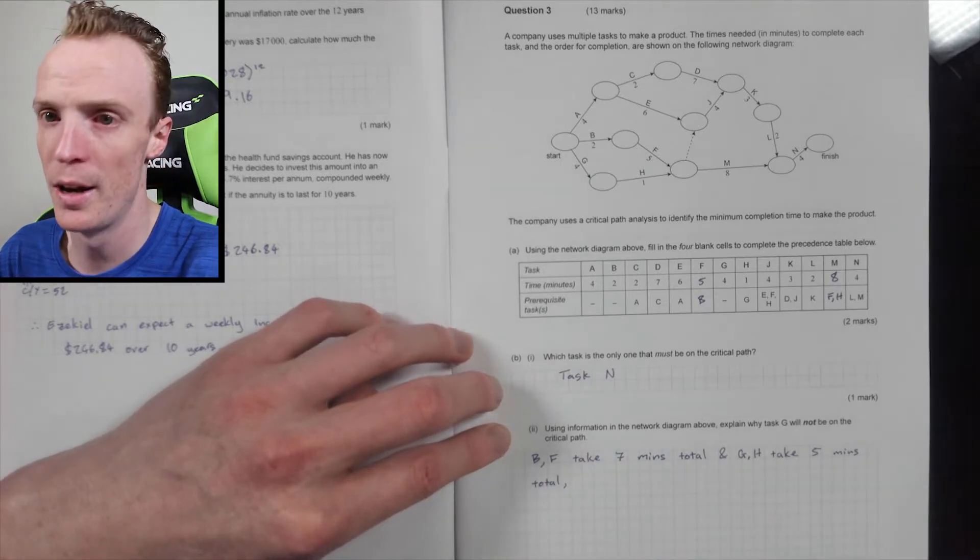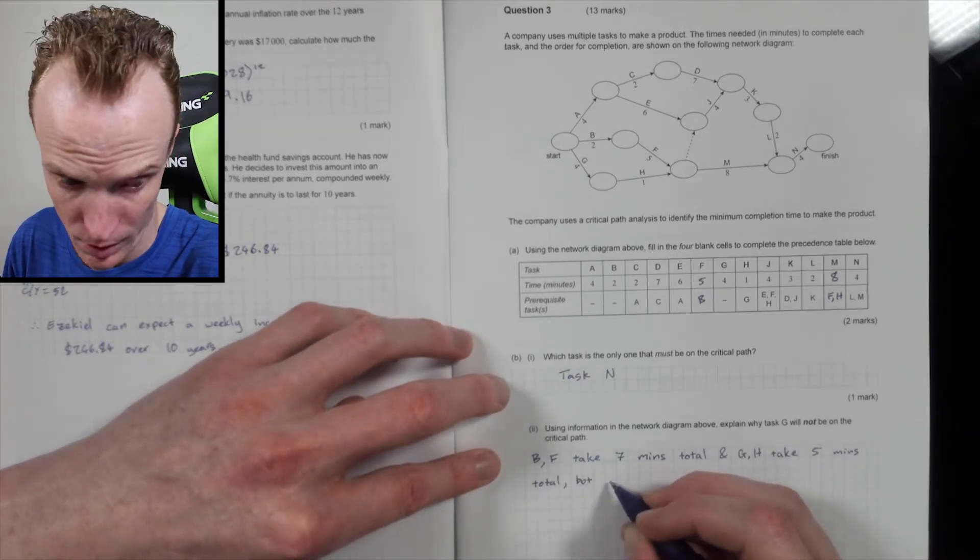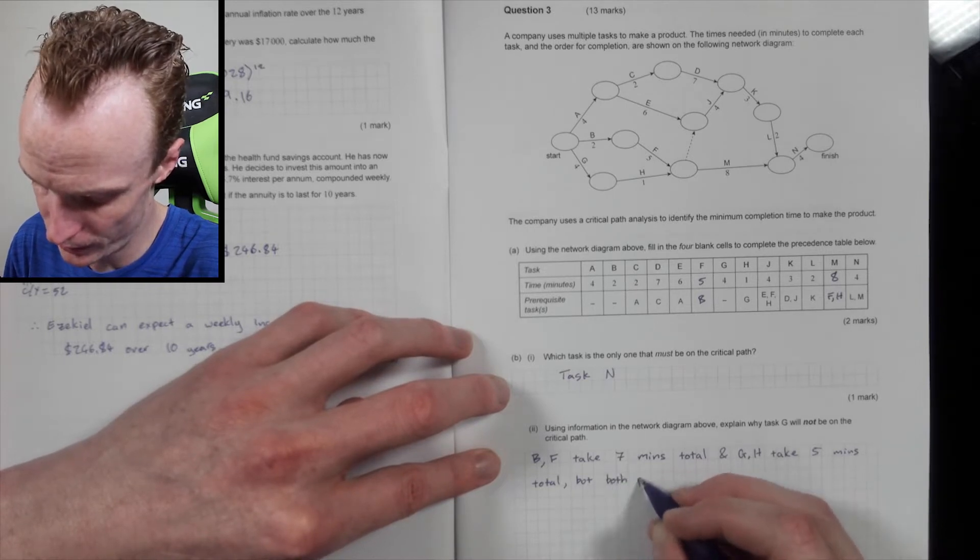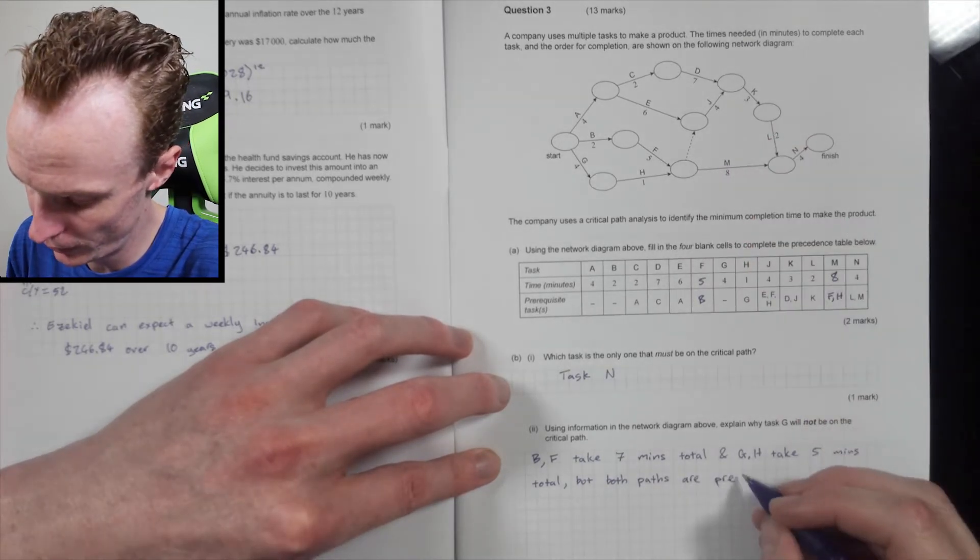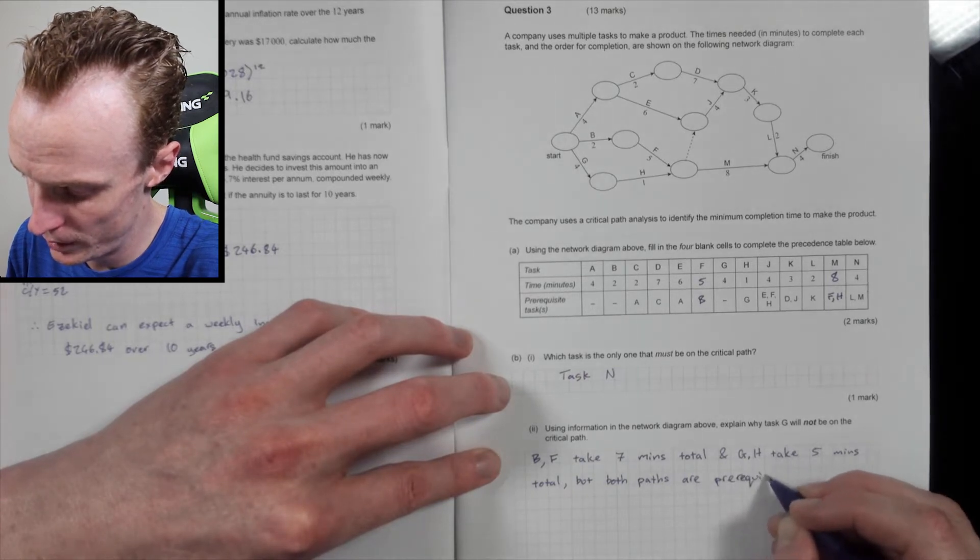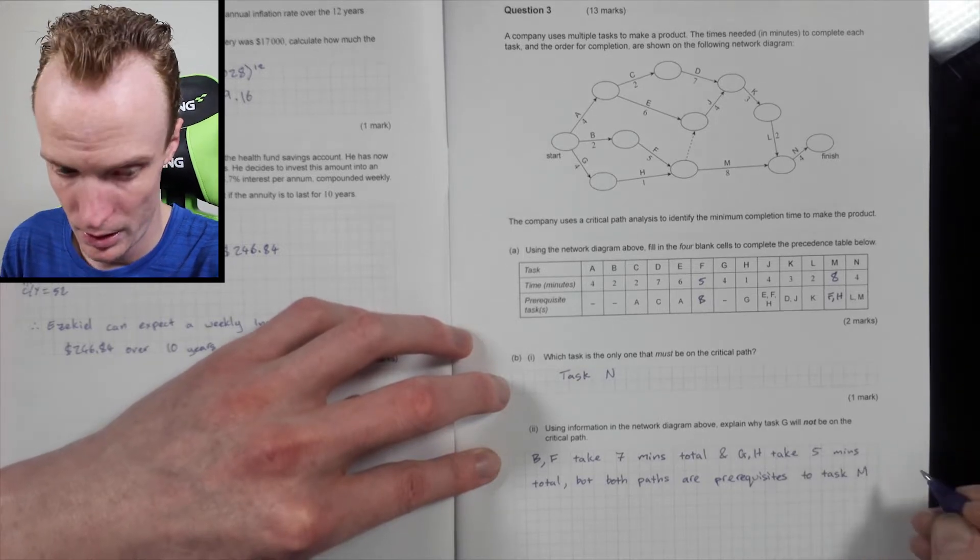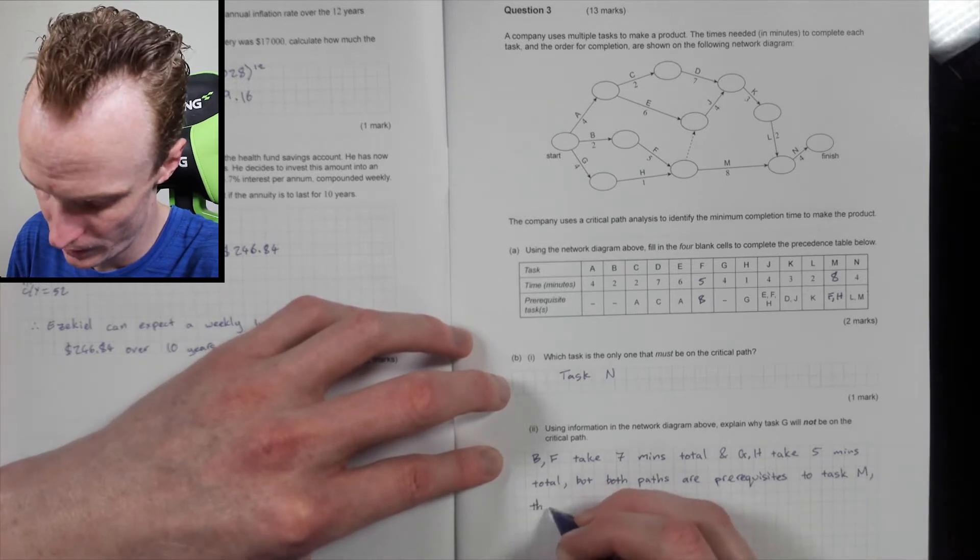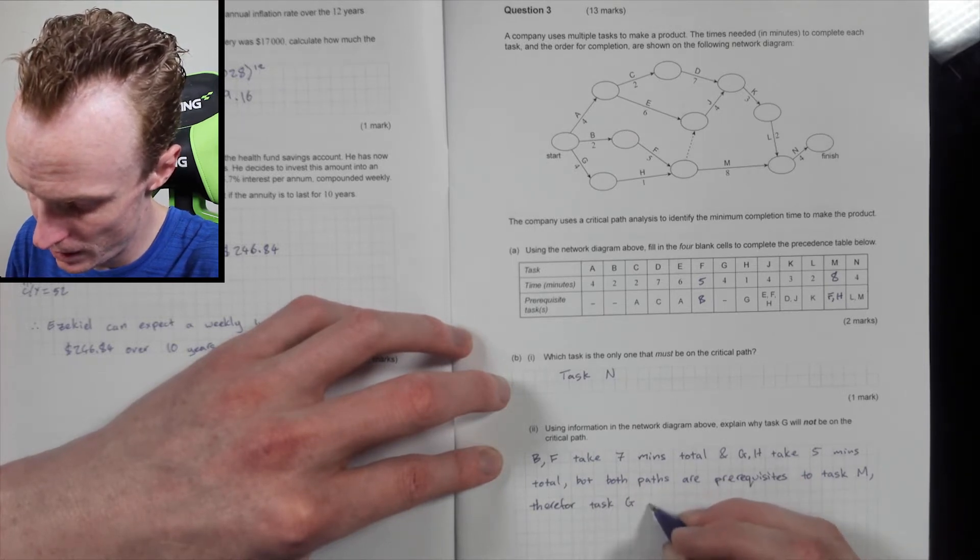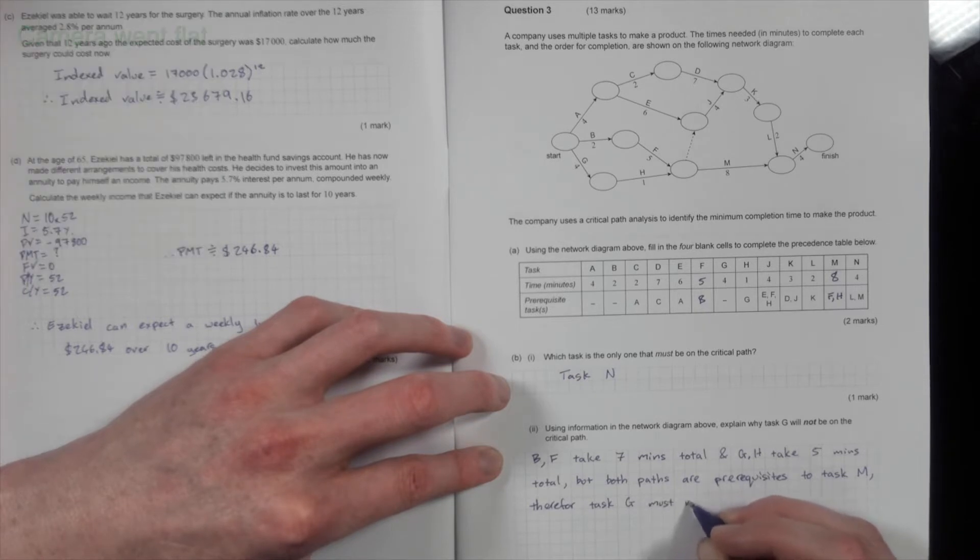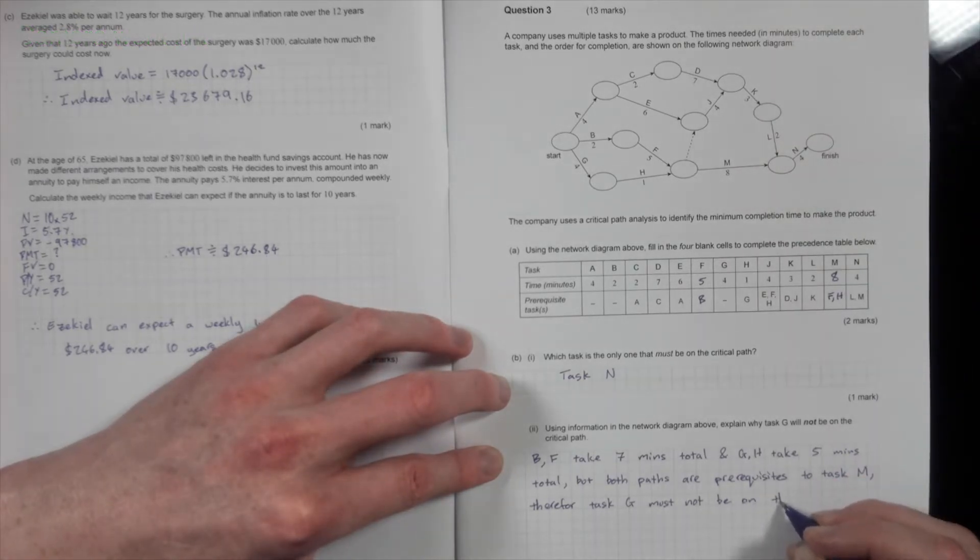Now you do have to explain why that's important. Just writing that's not enough. So, but both paths are prerequisites to this task here, so task M. Prerequisites to task M. Therefore, task G must not be on the critical path.